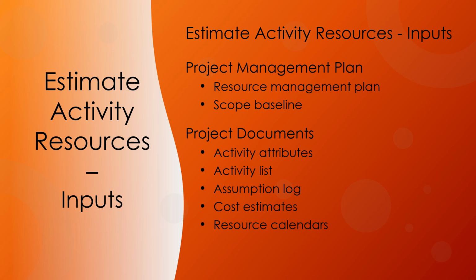Information on which resources such as team resource, equipment, and material are potentially available during a planned activity period is used for estimating resource utilization. Resource calendars also specify when and for how long identified team and physical resources will be available during the project. This information may be at the activity or project level. This includes consideration of attributes such as resource experience and/or skill level, as well as various geographical locations. The risk register describes the individual risks that can impact resource selection and availability.